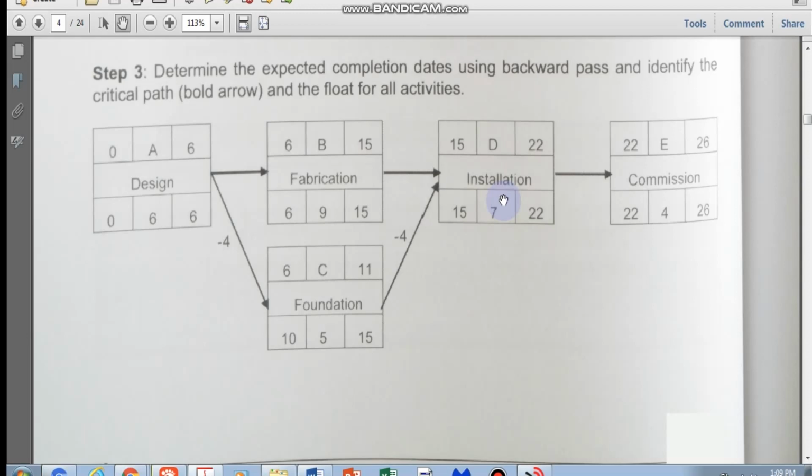So that is what we call activity crashing. And then, in the event of delay, you need to know where to focus your resources as well. So what about free float, you see? Free float is basically the spare time that is available for that particular activity without delaying the next activity, and that will be very useful when it comes to playing with your resources again.